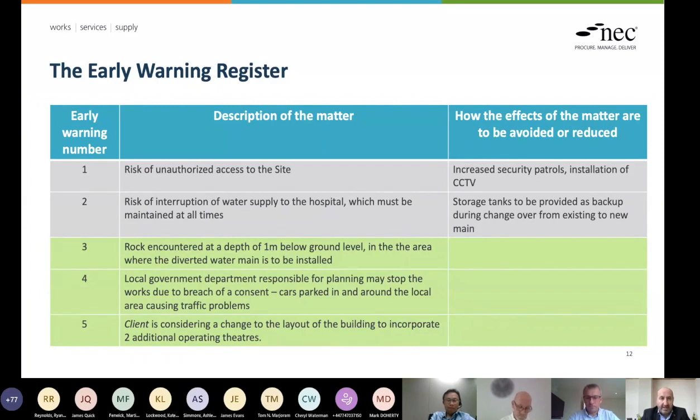And as you've already highlighted, and Hayman has, you may well have a project risk register, maybe all the way through concept design and outline design. Maybe it helps in agreeing a target or a price, and allows the client to understand what their risk and contingencies are. That's a document that serves a purpose there. But the early warning register is a post-award, post-contract document that is a live document, updated to capture these early warnings. They may well interplay with a wider project risk register, but this is a specific document needed under the contract to identify issues that may affect time, cost or quality.